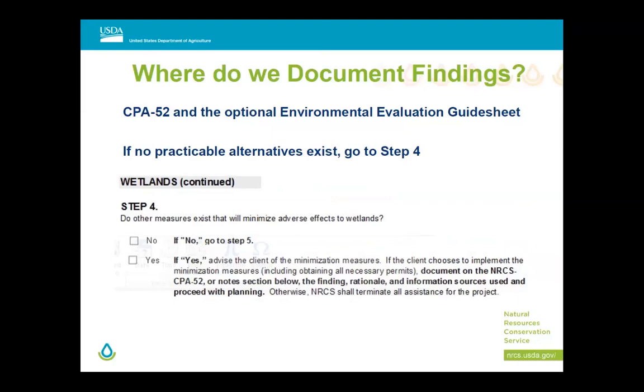few square feet? And the farmers wanted gravity so that they didn't have to deal with pumps, so that the manure would flow into the pit. The engineers had those constraints because that was a practicable thing, a factor we needed to consider. They're able to shift and rotate the manure pit to greatly reduce the amount of impact, to minimize. We got it down to just a couple thousand square feet of impact. That was following our planning process.